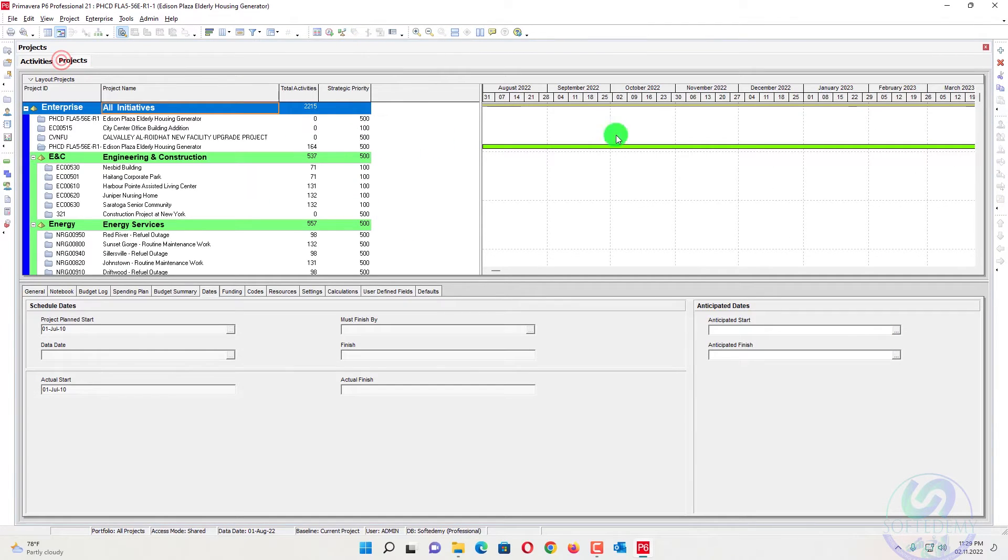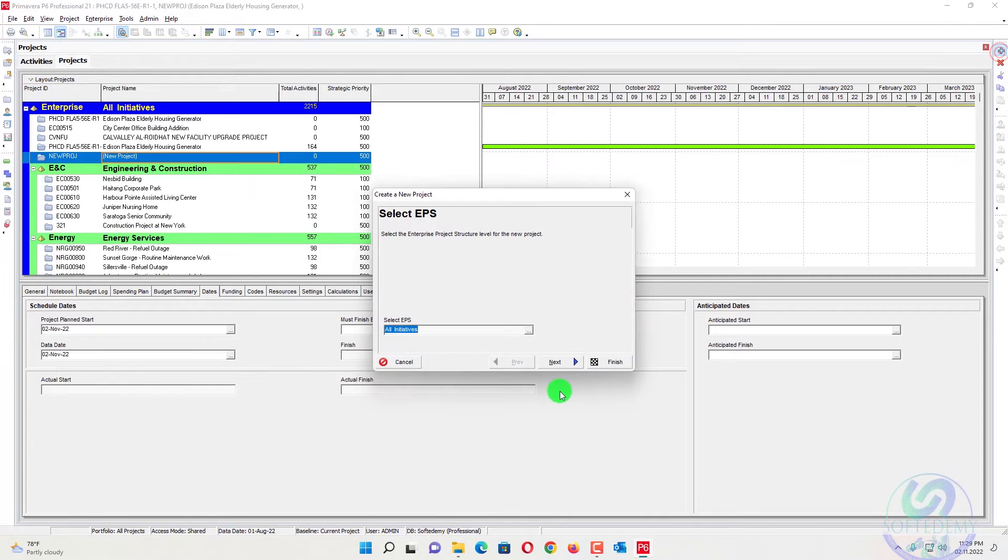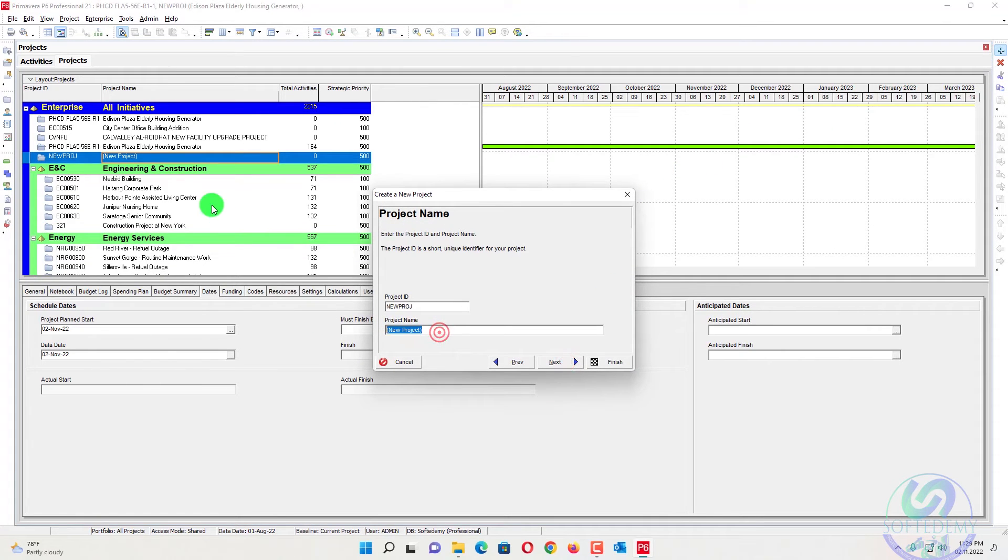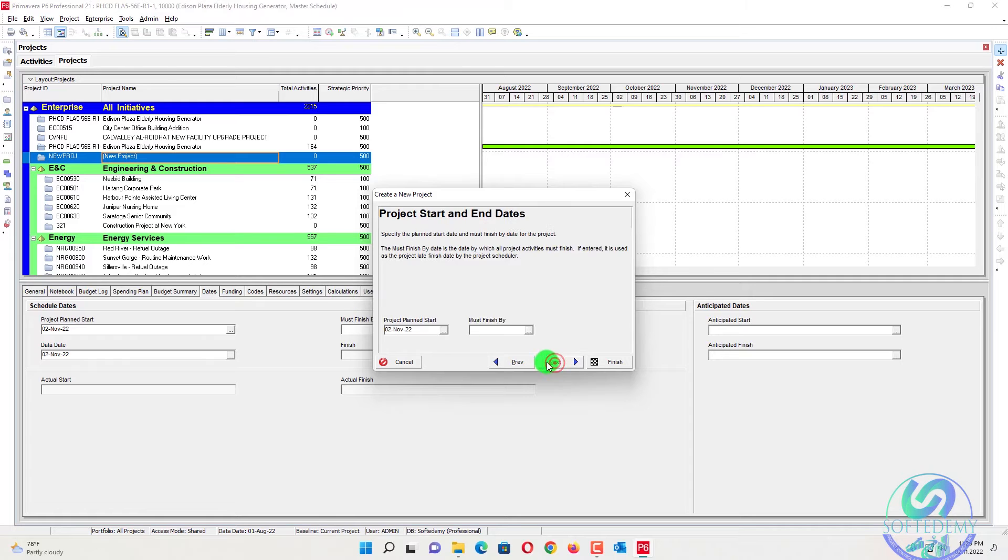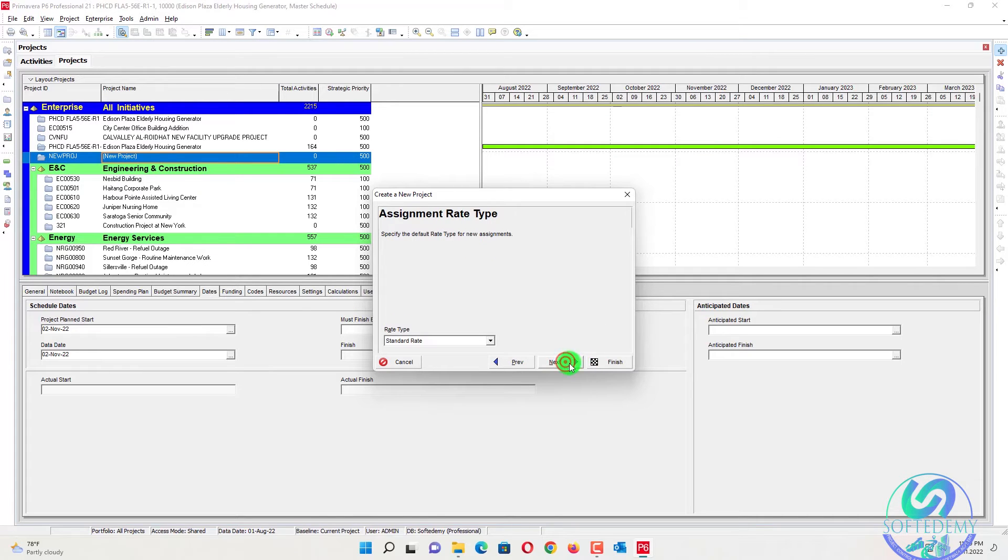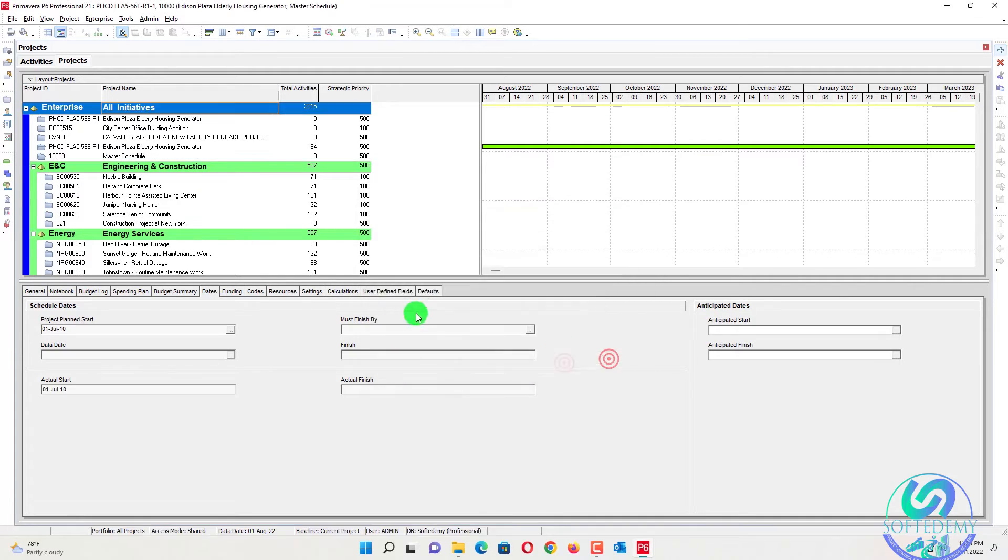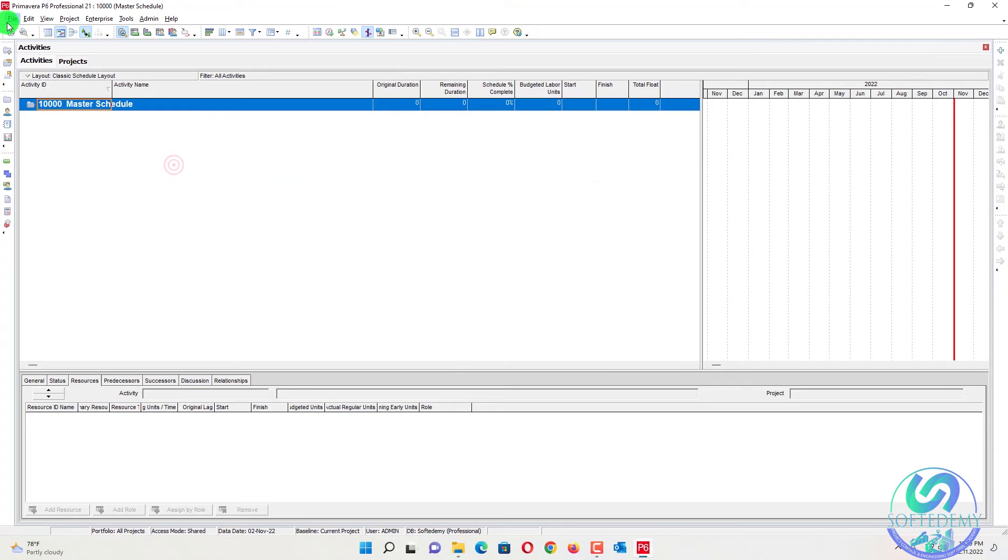And I will go in the project. I will create a new project with the name of master schedule. We will assign any name, one triple zero, next, next. We'll assign the date, start date and finish date also. Then finish. Now I will open the master schedule.